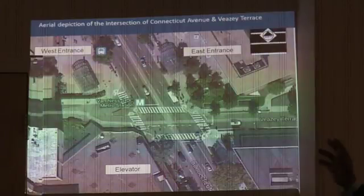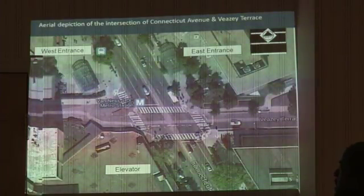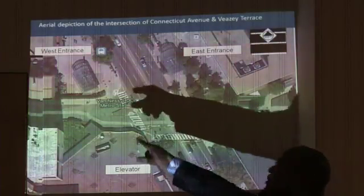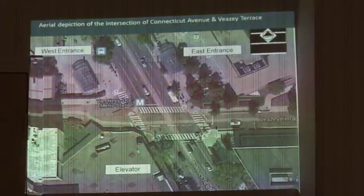The majority of our work will take place inside of the station, but the challenge of having the work performed during the midnight hours will require permitting from DDOT to allow our cranes and the delivery trucks of the trusses and new escalators to park alongside here on Connecticut Avenue. That is a traffic control plan that would allow that work to happen. It will start about midnight to about 4 in the morning. So again, that's a very short window, and that's only periodically.